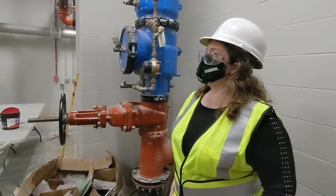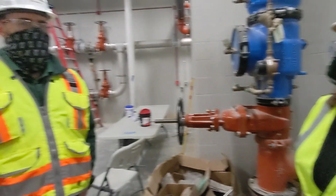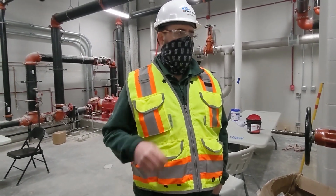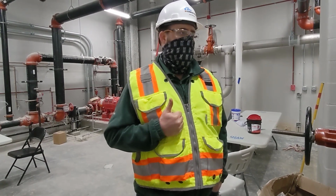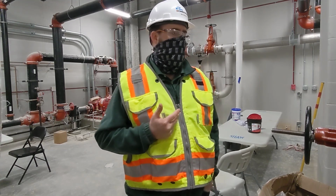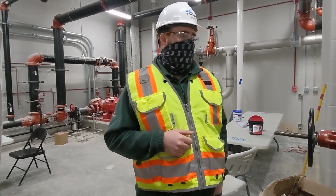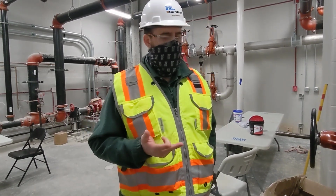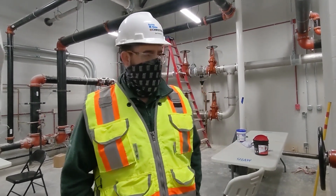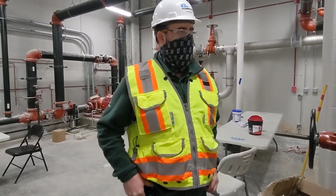So what were some of the major challenges you faced while installing the MEP system? Yeah, so on this project, we took a design-build approach with our subcontractors. That was bringing in our fire protection, our mechanical and plumbing, and our electrical contractor early on in the process, being a partner, identifying constructability issues, those sorts of things. And honestly, no job is going to be without its issues or troubles, but I feel like that was highly mitigated due to that collaborative group approach.